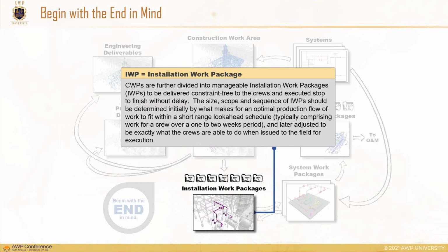So what's the size of those work packages? Well, here's the thing. For a long time in the industry, an IWP was sized. We said in the original 272 literature that an IWP, in essence, was 500 to 1,000 hours' worth of work, which is not wrong. But that is a go-by. It's not a rule. And IWPs can be sized in many different ways.